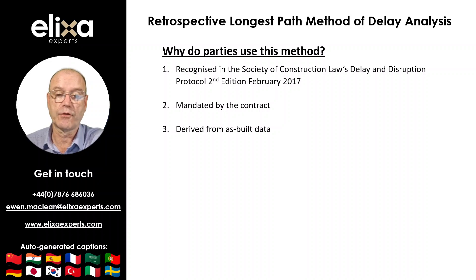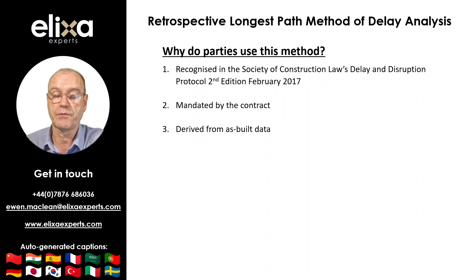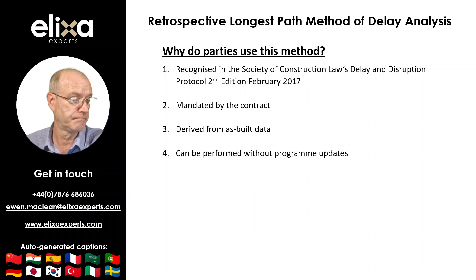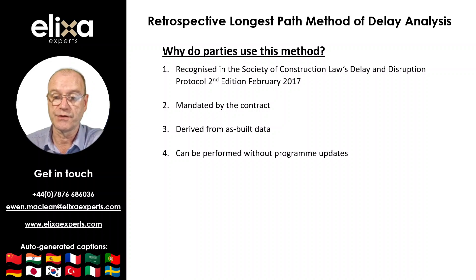The retrospective longest path method of delay analysis is derived from as-built data and so represents what actually happened. This improves the robustness of the method of analysis by avoiding reliance on hypothetical arguments. The method can be performed where programme updates either do not exist, are too few, or potentially just unreliable.